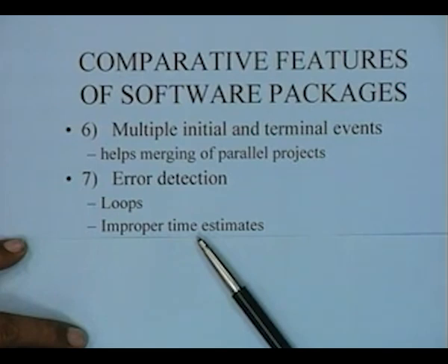This could be done very simply if there is a database within the package which would specify that any particular activity has conventionally been within a certain range of, let's say, 3 months to 6 months or something like that, and if it finds that you have keyed in a data like 20 months for that particular activity, it says no, check it, there is something wrong with that.